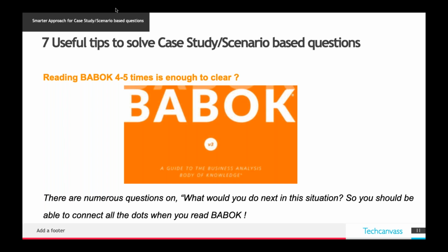If the requirements are not clear, or if the requirements are technically not feasible, move that item to the top of the sprint or to the top of the backlog. Okay, this one particular line is hidden in one of the paragraphs. And if I'm preparing the question bank, what I'll do is I'll give you a scenario.